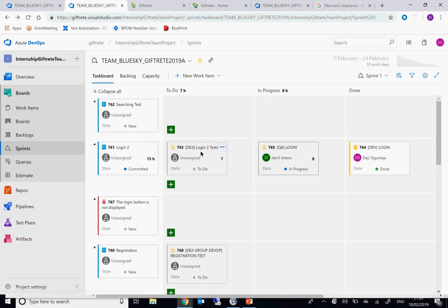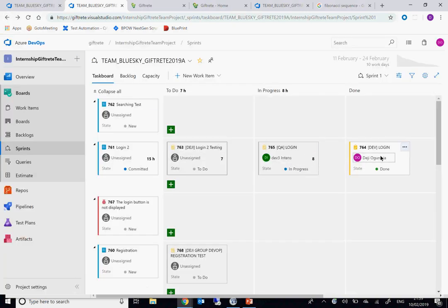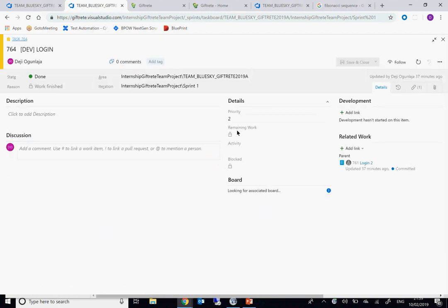So it's different from the effort. In the task, you have the time it's going to take you to do that particular story. So it's different from effort. Like I said, effort is not time-based. It's basically an arbitrary number that is relative to complexities and everything. But at the task level, we talk about the time that it takes you to do it.